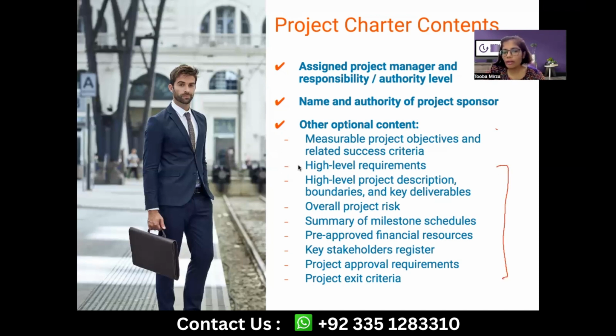So you can see that everything is high level: high level requirements, high level scope, high level risk, high level milestone schedules, payment schedules, payment terms and conditions, stakeholders and requirements, and maybe high level dependencies and constraints. Everything that you know about the project is going to be definitely high level because you have never gone into the detailed planning of the project so far.